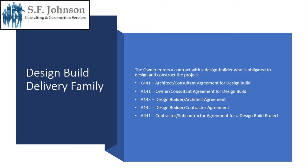Next, the design-build delivery family. The owner enters into a contract with the design builder who is obligated to design and construct the project. This is becoming more popular. The forms include: C441, architect-consultant agreement for design-build; A141, owner-consultant agreement for design-build; A143, design builder-architect agreement; A142, design builder-contractor agreement; and A441, contractor-subcontractor agreement for a design-build project.